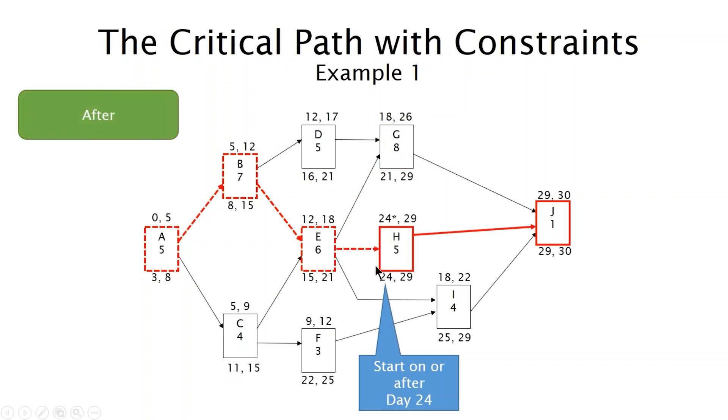And it's a simple soft constraint. So here's what happened. We pushed activity H into the future, which then altered the critical path. So by pushing H into the future with that start on or after constraint, it started, essentially what it did is it caused H to now drive J's dates. And it completely altered the critical path, as you can see.